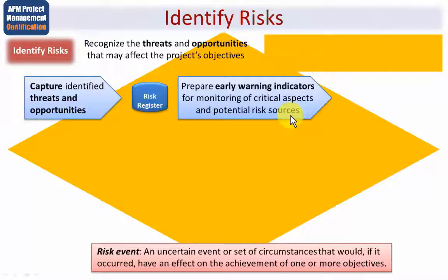Because it's a major product, let's imagine, forming part of your solution, such fluctuations may cause the project to go outside of budget. So rather than wait until that happens and then panic, it would be a good idea to see if we could get someone to keep an eye on exchange rates, giving us advance warning if and when it looks like such exchange rates would impact our project.